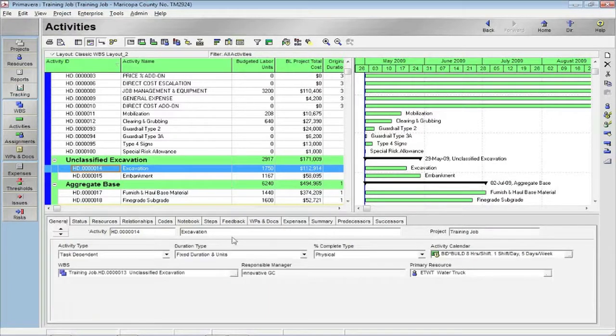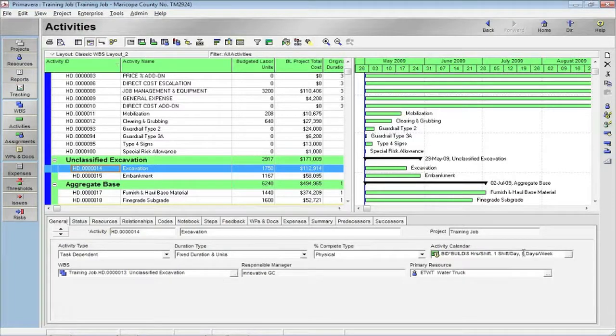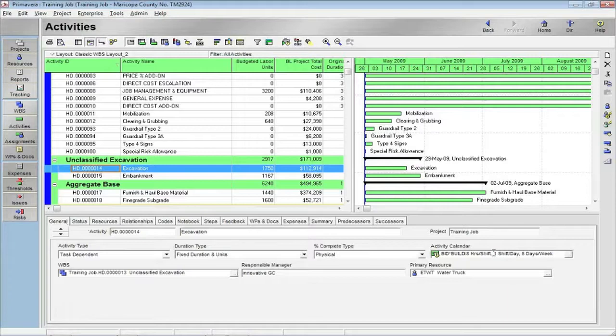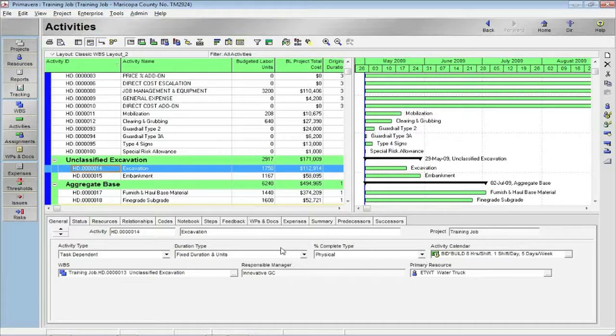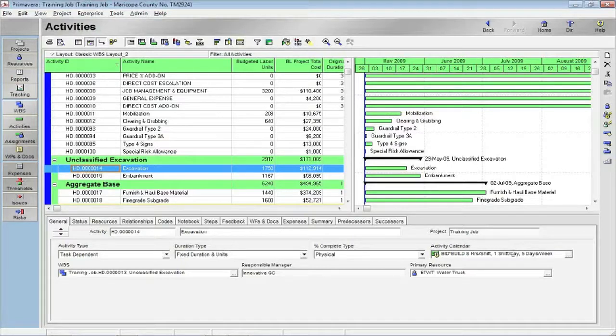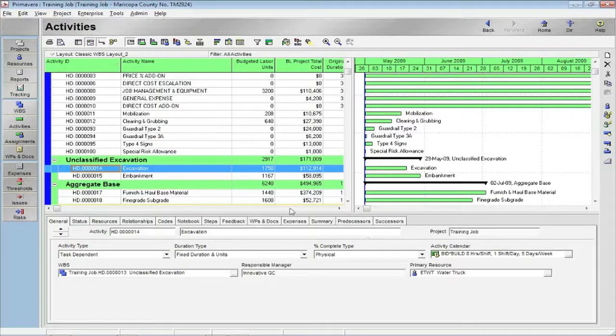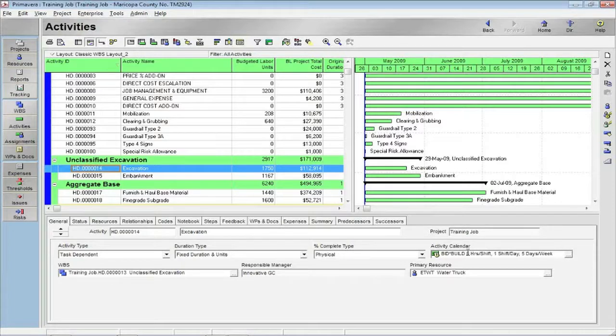We also send out Hard Dollar's calendar. Specifically, what Hard Dollar does, it sends out the hours, because Hard Dollar's calendar and Primavera's calendar don't always exactly meet. In fact, Hard Dollar has the ability to have shifts and so many shifts per day. Primavera just has hours per day. So we send hours out, but you can change this per activity if you want to, to use a different shift to come up with the hours and the total days that you would want to generate based on a different shift than what Hard Dollar used.